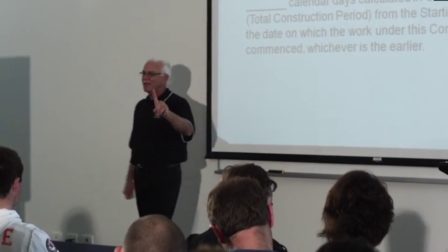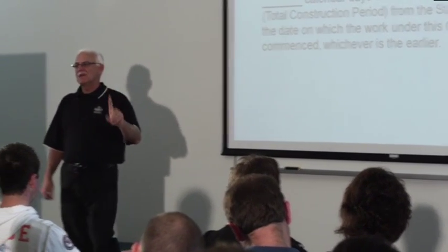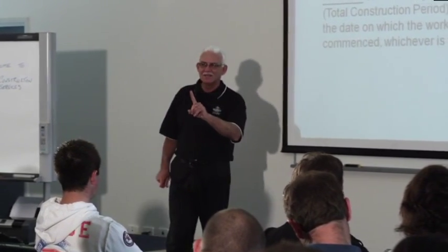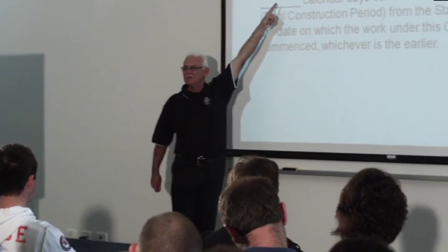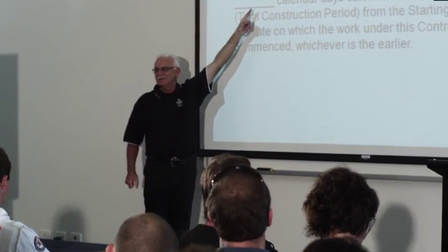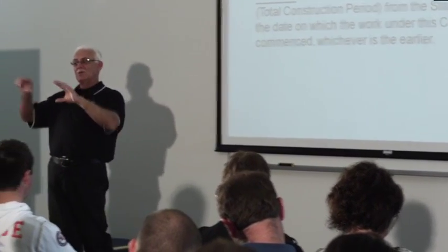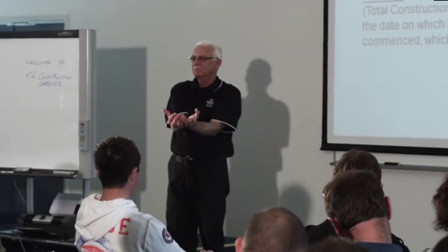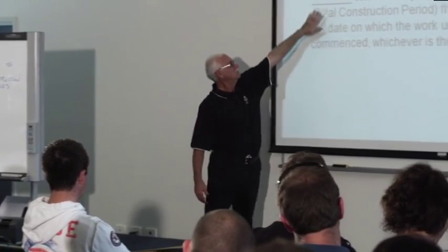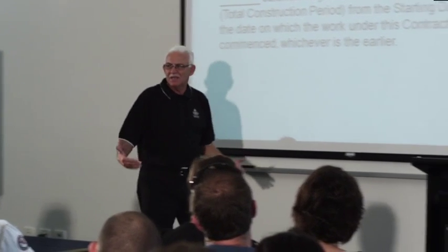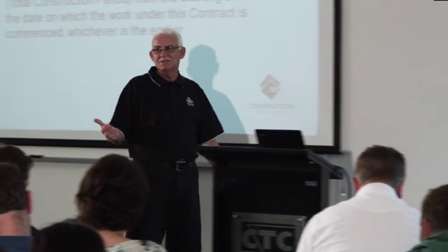Now, we haven't put in a start date. We put in that we will start 7 days after we've got everything, right? So you're not committed to a start date, and this way you're not committed to a completion date. So the best thing that you could do is tick the box to say, we will start when we've got everything ready, and we will finish so many days after we start. Right? And there's your contract. It's as simple as that. If you start putting in dates, you could be up for liquidated damages.